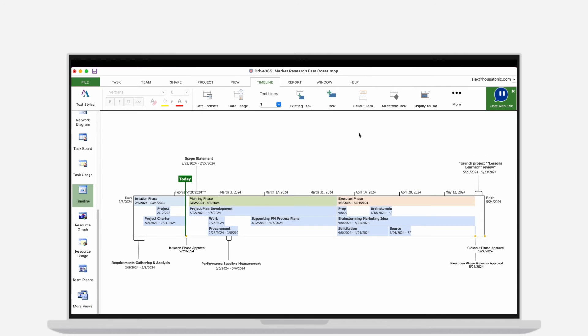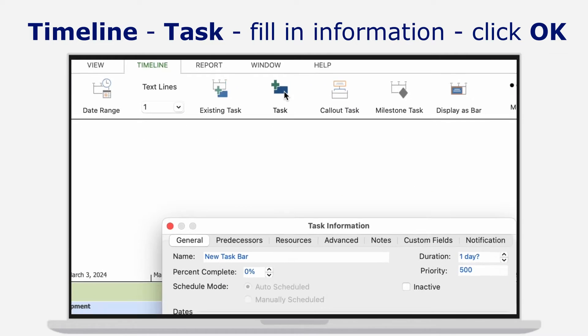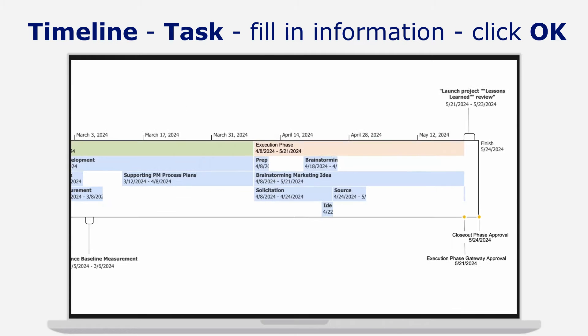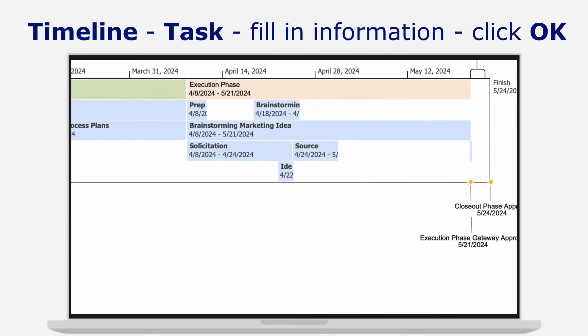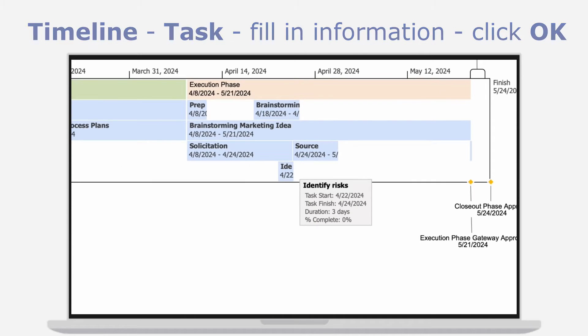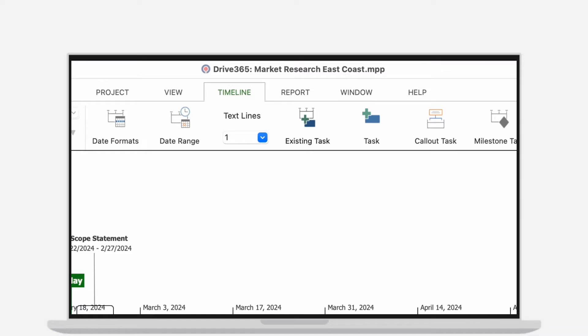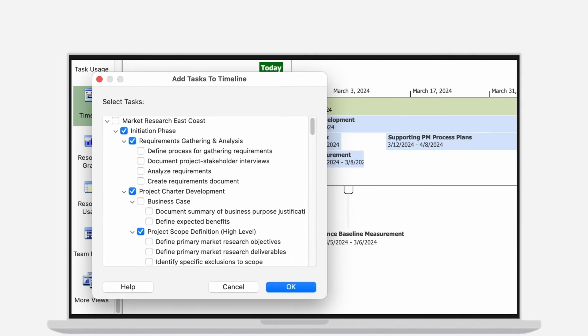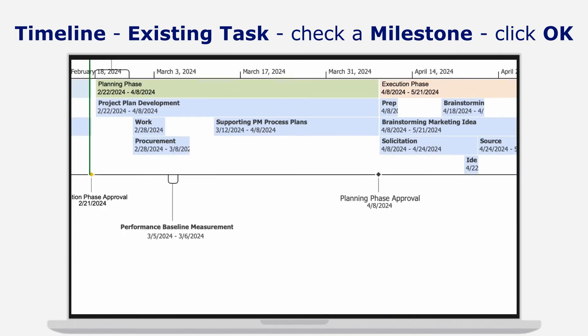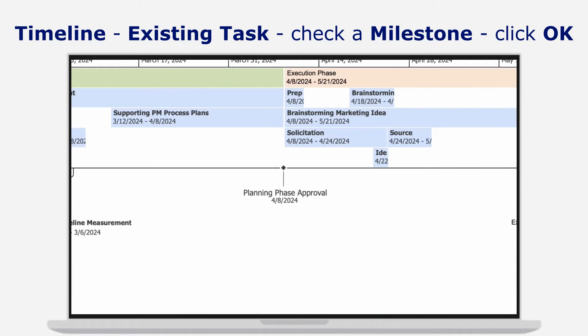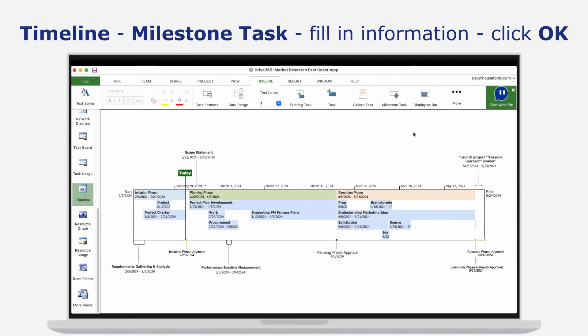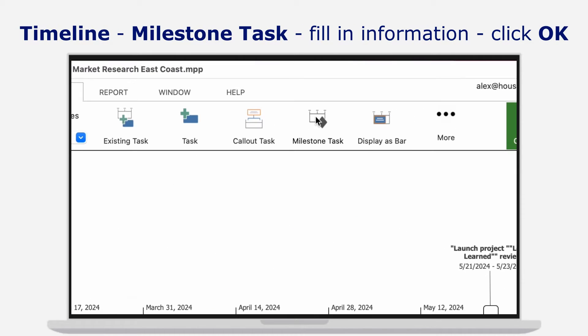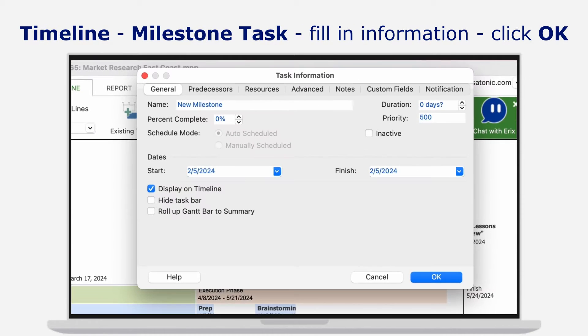You can also insert new tasks directly in the view by going to menu Timeline, Task. Type in a name, start and finish dates, and click OK. More than that, milestones have their own distinctive appearance. Just add an existing milestone from the Add Tasks dialog or a new one by going to menu Timeline, Milestone Task. Type in name, set dates, and click OK.